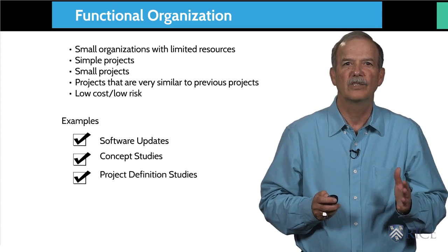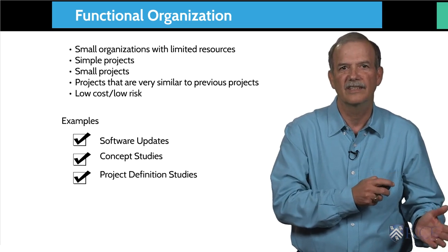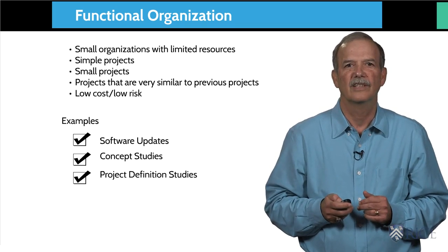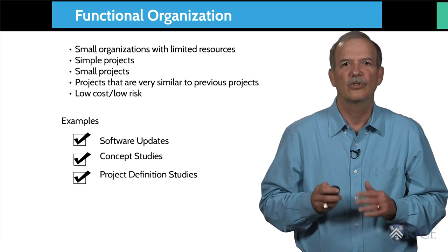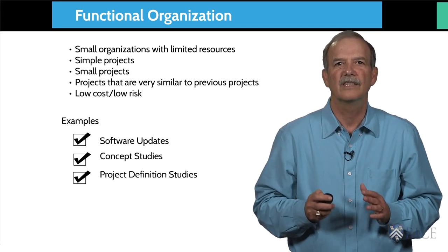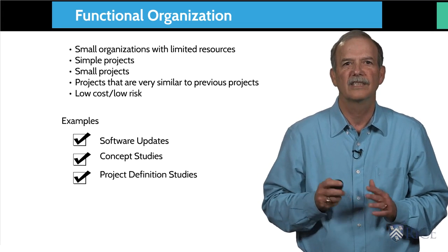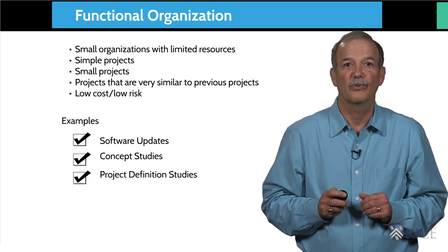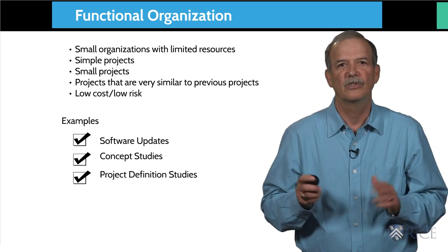Similarly, project definition studies, which take the concept studies and advance them to the next step, are done in the functional organization. These studies start to put some of the project requirements and specifications together to give the concept more definition in anticipation of a project being authorized. Again, until the project is authorized, limited expenditures are the rule.